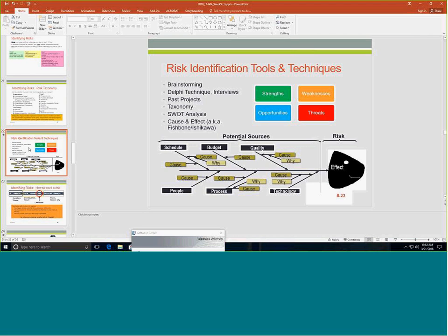So now, how can we identify risks? There are some tools and techniques that we're going to talk about. One of the identification tools, and I've used it myself, is to get the technical personnel all in one room for an hour. That's very, very expensive, but it's worth it in some cases. And distribute little flashcards or even little sticky pads with sticky notes.